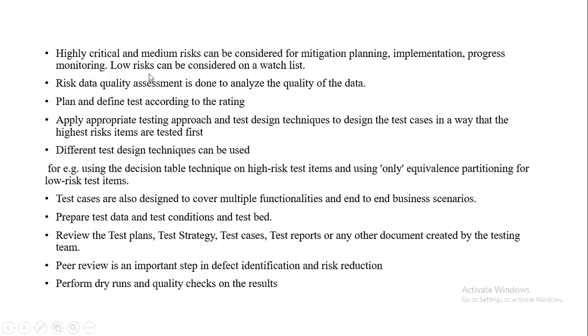Okay, so low risks, whatever there are, will be considered on a watch list. For high and critical risks, we are again going to do mitigation planning, implementation, and progress monitoring. So risk data quality assessment is nothing but analyzing the quality of the data. Then we plan and define tests according to the rating. We have to plan it and test it according to the rating.